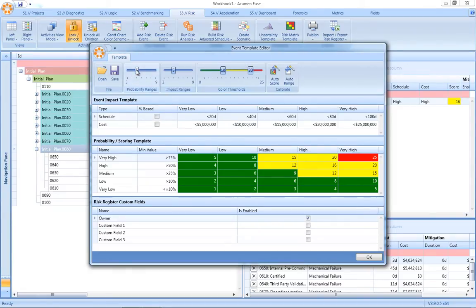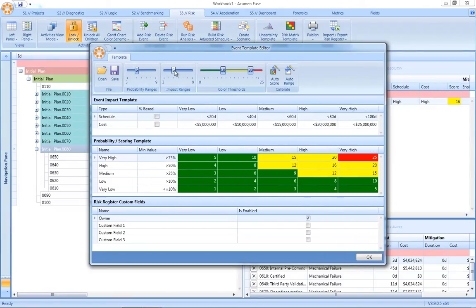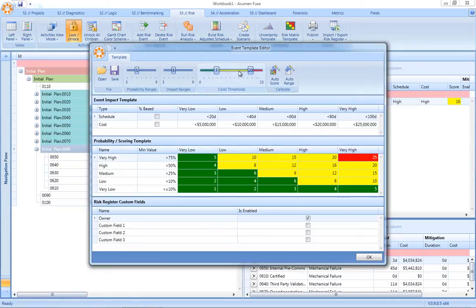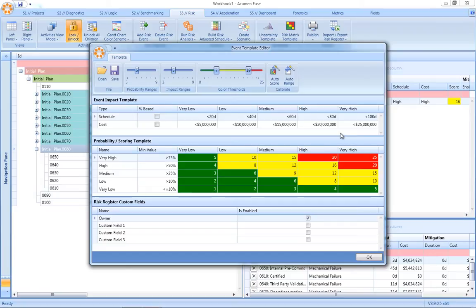We can define the number of probability ranges, impact ranges, and of course our tolerance to risk through the use of risk thresholds. In addition, Acumen Risk has a unique capability for automatically defining the ranges or the buckets based on the size and scope and cost of the project against which we're running our risk analysis.